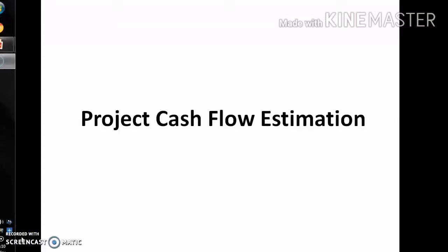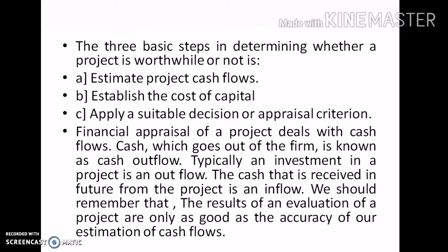Everyone, let us discuss project cash flow estimation. In a capital project, the estimation of cash flow is very essential because this cash flow estimation will give you the exact result of a capital project, that is, whether that project is beneficial for us or not. The three basic steps in determining whether the project is financially worthwhile or not are to estimate the project cash flows, establish the cost of capital, and apply a suitable decision or appraisal criteria.